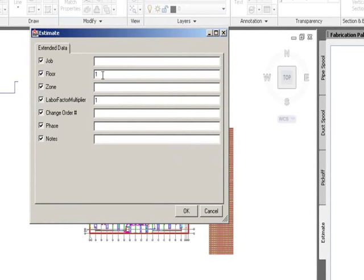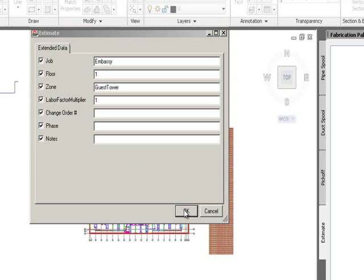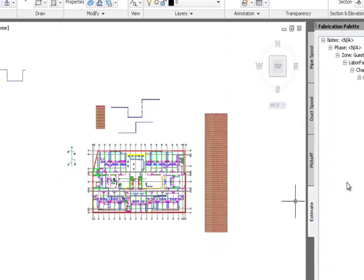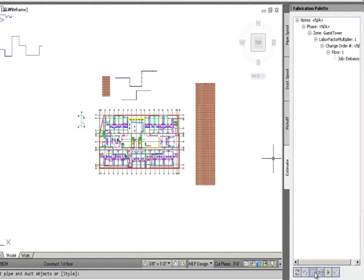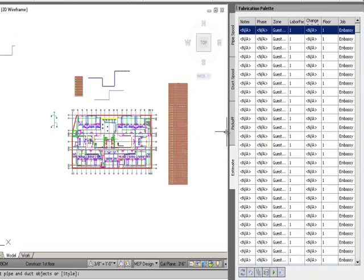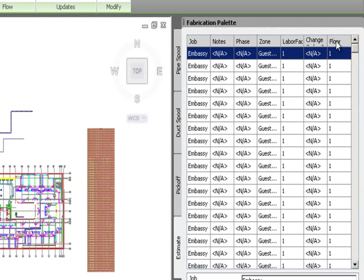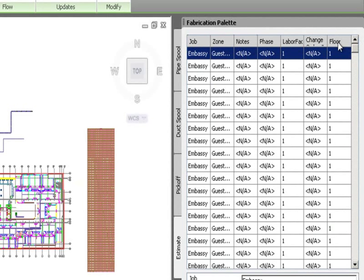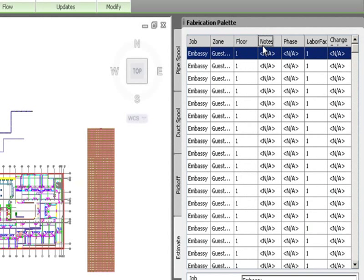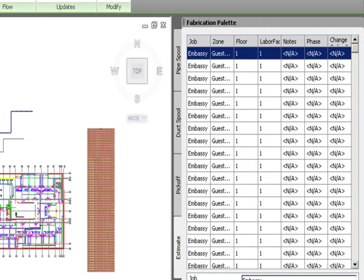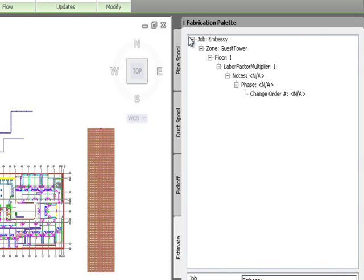I fill in the job information — for instance a job name, first floor, zone as 'Guest Tower' — and enter whatever information I want along with a 1.0 labor factor. Clicking OK assembles this into the Estimate tab in a tree structure. I can switch to a grid view and rearrange the breakdown hierarchy: job at the top level, then zone, then floor, then labor factor, then notes.